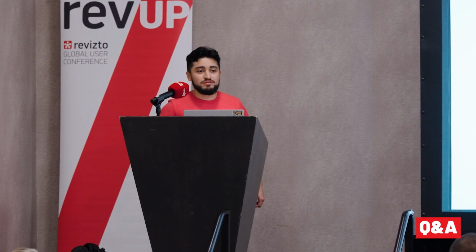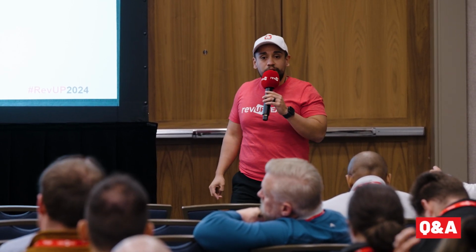So just like how you can change a stamp category in an issue, you'll be able to change the issue type, which will give you your custom statuses for another type of workflow. But when you change a status, it will close an issue, right? Yeah, that's correct. Just to mention, you can apply rules, because custom statuses are still looking for the original open, in progress, solved and closed. And so if you assign a custom status to that closed category, that forces the issue to close itself. So you just have to map the process out, essentially.